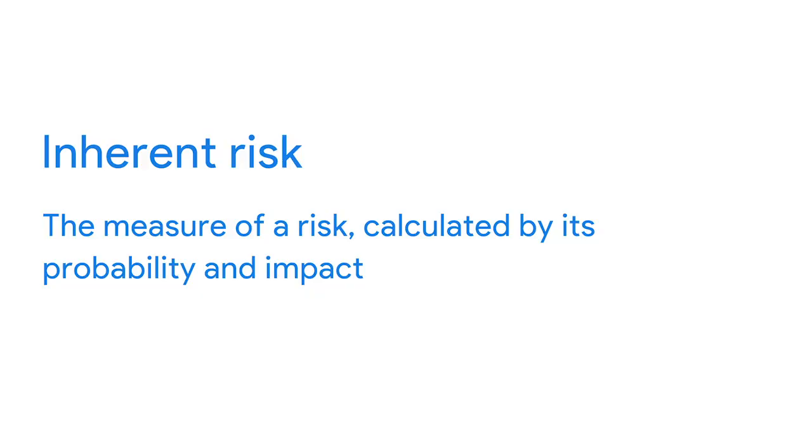These two considerations come together to determine the inherent risk rating. Inherent risk is the measure of a risk calculated by its probability and impact. Measuring the inherent risk gives us a method for understanding a risk. Inherent risk is also determined on a high, medium, and low scale.